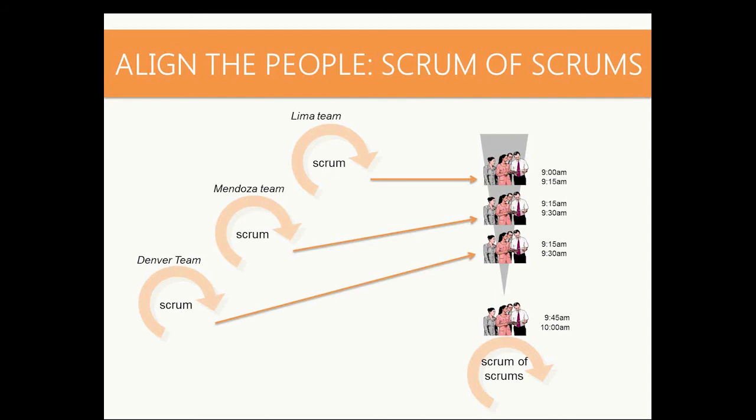Difference is that meeting up with the steering committee, with the Meta Scrum, is typically a few days after the sprint ends and not every day.